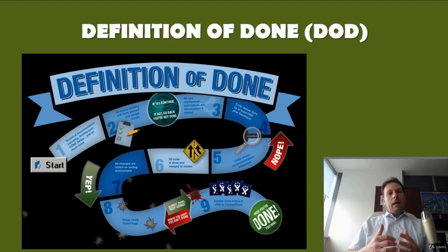The definition of done ensures everyone on the team knows exactly what is expected of everything the team delivers. It ensures transparency and quality fit for the product and organization. The definition of done promotes transparency by providing everyone a unified understanding of the work completed during the increment. If a product backlog item doesn't meet the definition of done, it shouldn't be released or presented at the sprint review. Instead, it is returned to the product backlog for future consideration.